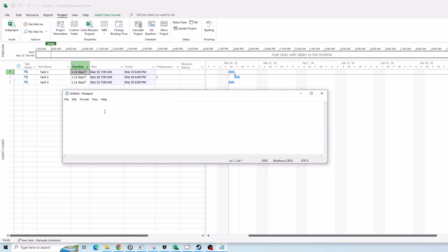For our calendar, we mentioned the working hours are 7 to 12 and 13 to 18, right? So this is what we defined for a working day. It means if I sum up the working hours, we're going to have a 10-hour working day. Between 7 to 12 and 13 to 18, we have 10 hours, right?